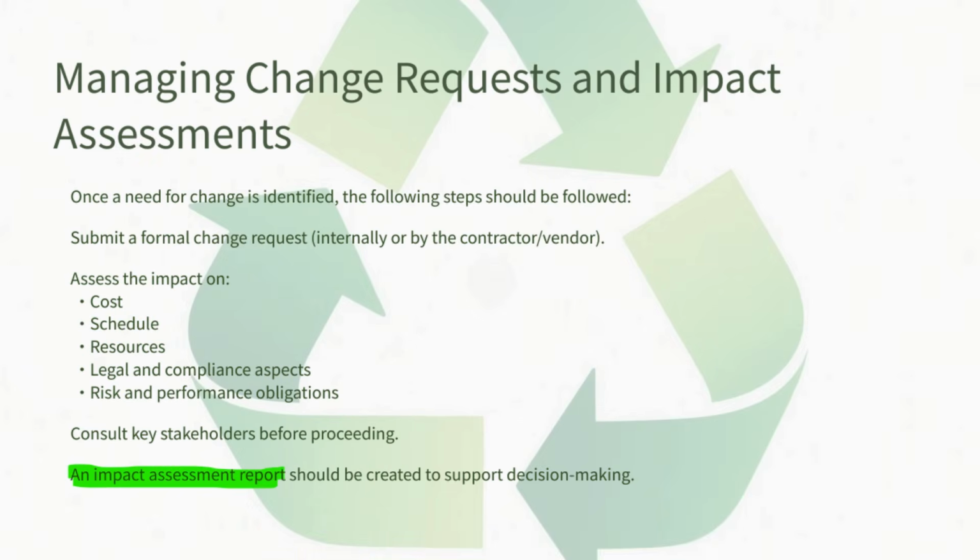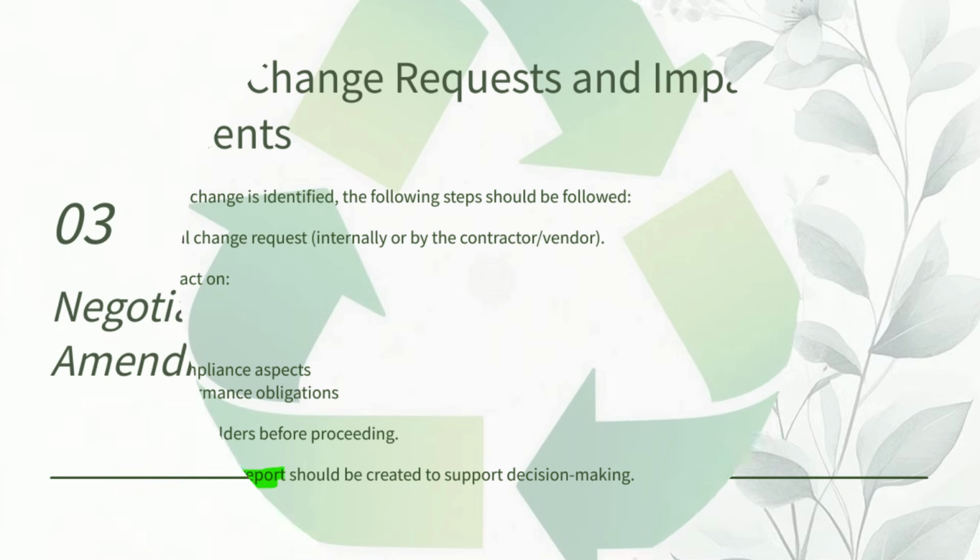Finally, prepare an impact assessment report. This report summarizes all the findings from your analysis, including the cost, schedule, resources, risks, and compliance implications. It provides decision makers with a clear understanding of how the proposed change will affect the project. Based on this report, management or the client can decide whether to approve, reject, or modify the change request. So I hope this is clear.